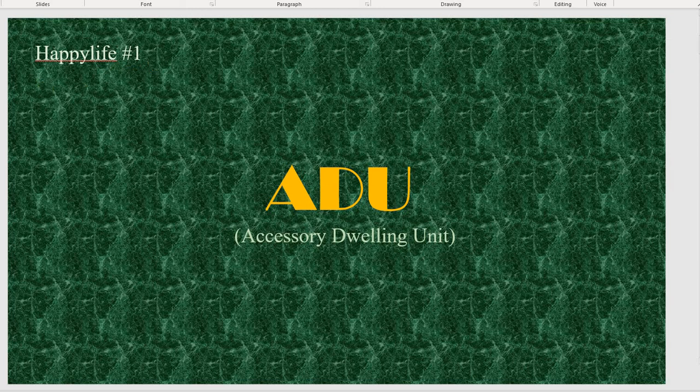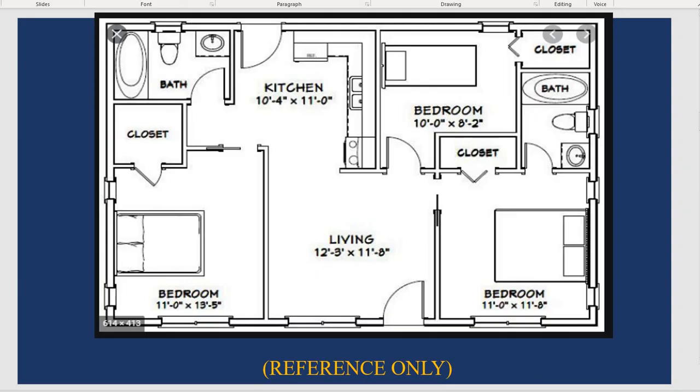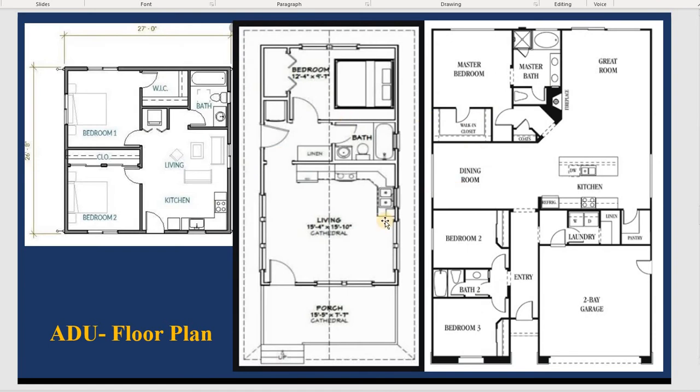Oh, one more thing I need to tell you. As a plan checker, when I see a submittal like this, I usually check the first one. I check the bedroom with the egress window or access window, the egress window, to make sure that in the bedroom the people can get out in case of emergency. And the second one, I check the tempered glass for the bathroom, and also I check the entrance, the main hallway, minimum 3 feet. And after that, I will check electrical inside the bedroom and outside from the kitchen, something like that.